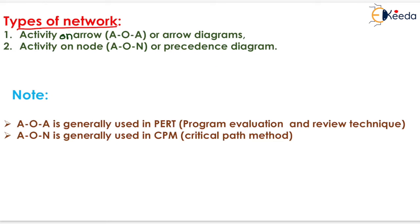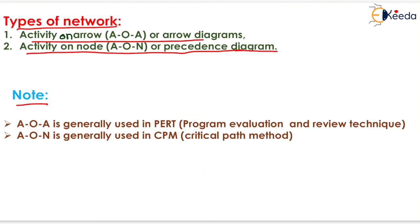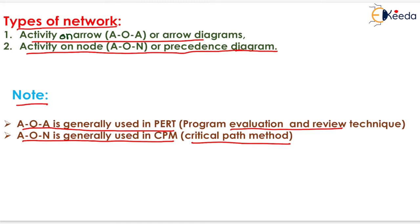The types of network are: Activity on Arrow (AOA), also called arrow diagram, and Activity on Node (AON), also called precedence diagram. AOA is generally used in PERT, that is Program Evaluation and Review Technique, and AON is generally used in CPM, that is Critical Path Method. That is all about network analysis.